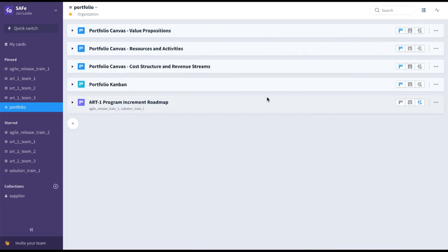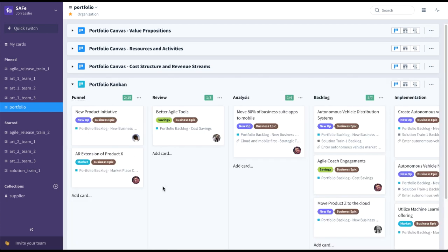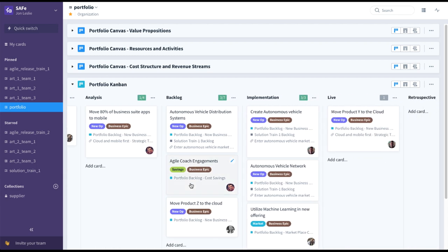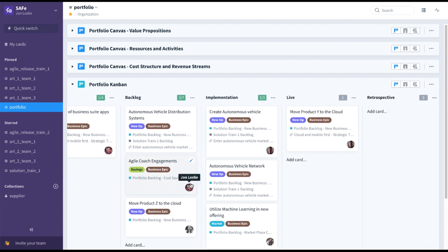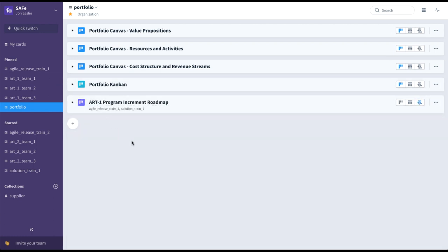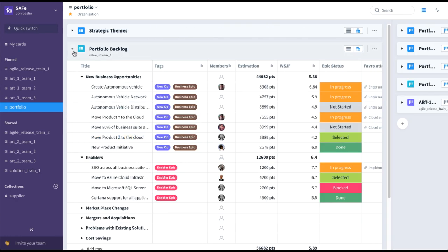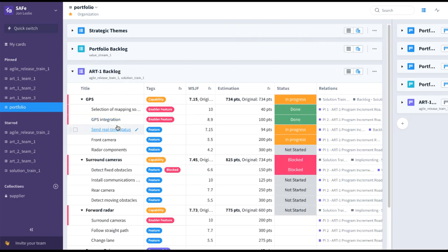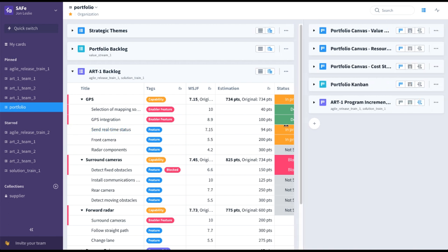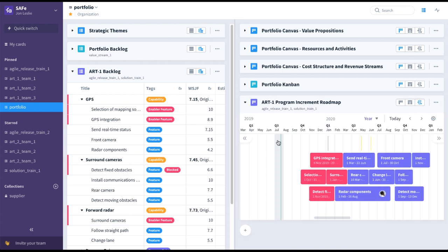Also here at this level we have the portfolio Kanban, where we can visualize business epics flowing from funnel through review, analysis, backlog, implementation, all the way through live and retrospective. Also included in this example, to help see progress, we have the single Agile Release Train backlog and the single ART's Program Increment roadmap here in this collection — essentially everything we need to drive the overall business.